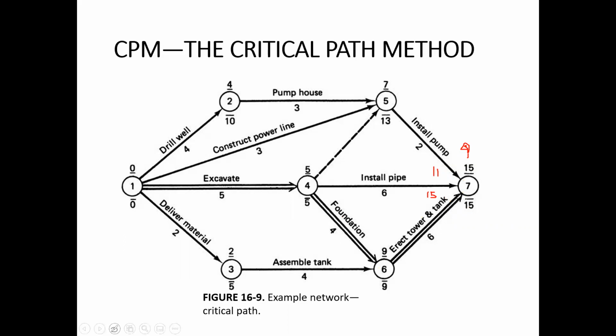And one more question. So for LET we should calculate backward, and for EET forward? Yes, correct. So first we will calculate the EET, earliest event times, by the forward pass calculations. And after completing the forward pass calculations, we will do the backward pass calculation, which will calculate the latest event times.